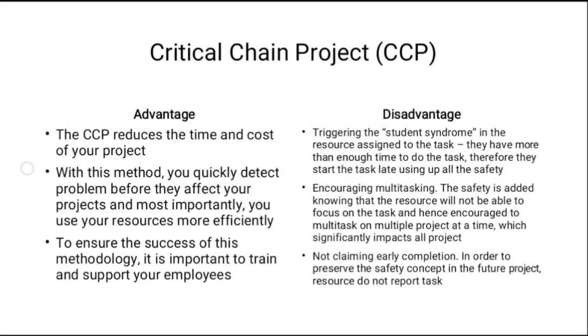Disadvantage: triggering the student syndrome in the resource assigned to the task. They have more than enough time to do the task, therefore they start the task late, using up all the safety. Encouraging multitasking: the safety is added knowing that the resource will not be able to focus on the task, and hence they are encouraged to multitask on multiple projects at a time, which significantly impacts all projects. Not claiming early completion in order to preserve the safety for future projects. Resources do not report tasks.